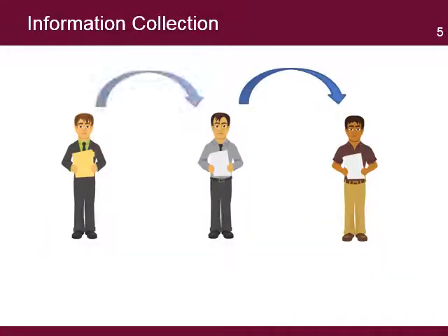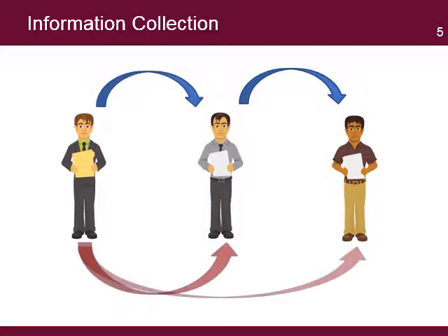For example, if a project manager receives country statistic information from another project manager who receives information from the main office, it may be more efficient for the main office to provide such information directly to all project managers. This direct flow ensures that all managers receive the same information at the same period and reduces the potential for information to be miscommunicated.